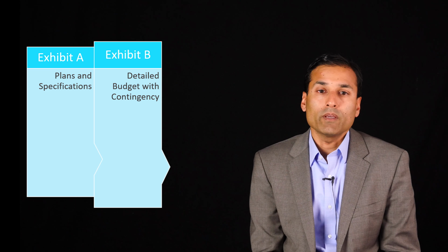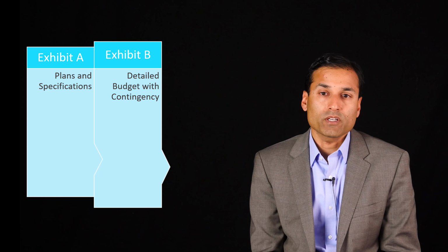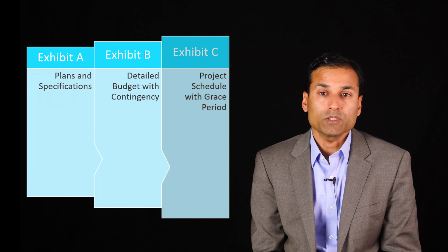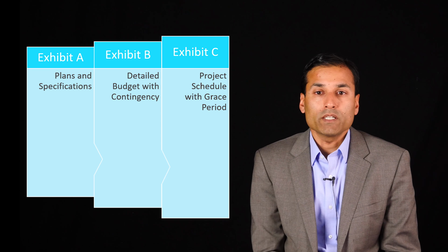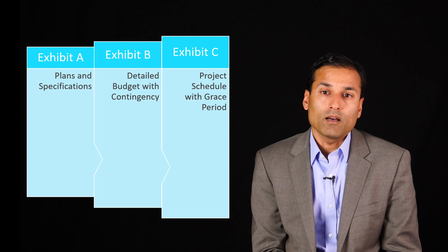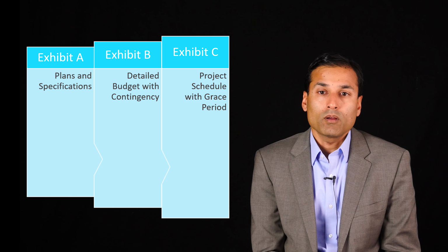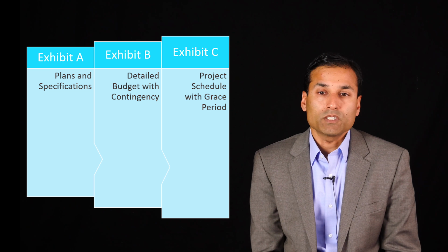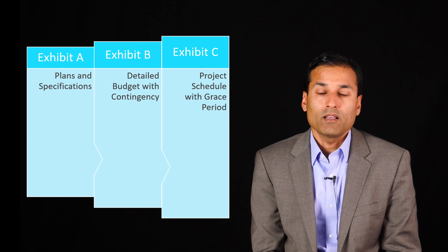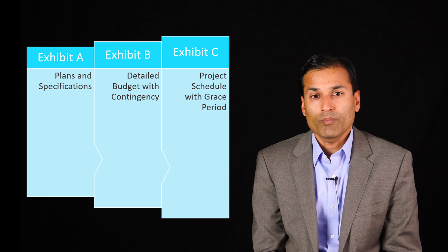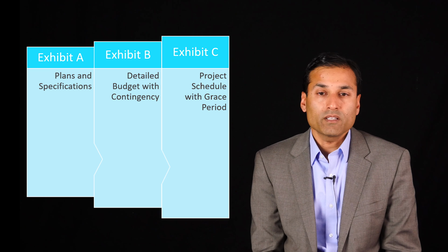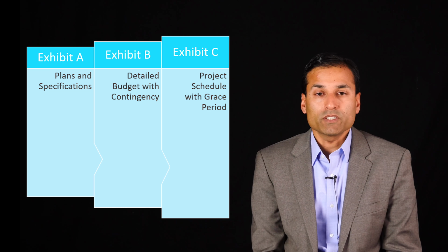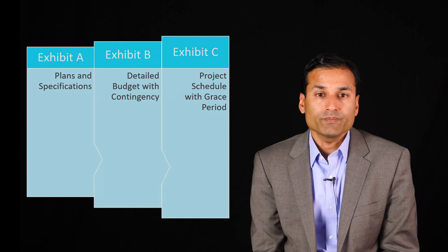And finally, in those capital improvement project contracts, we'll make sure we have a project schedule. Even if the cost of the project is within budget, it's oftentimes the delay in a project that makes the labor more expensive than anticipated. So it's very important to keep the project schedule as part of the contract to make sure the construction project is done within time. Sometimes there are grace periods built in for reasonableness, but otherwise you need the incentives there to make sure the project is done on time and obviously on budget.